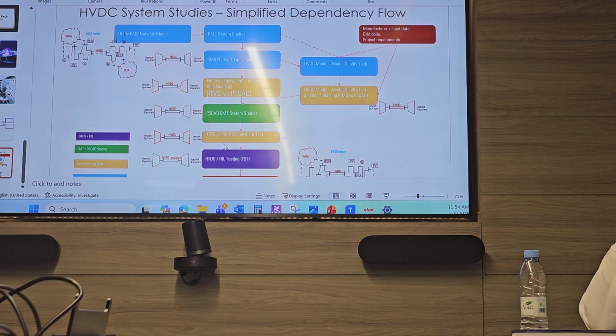So this is what I call factory acceptance test, and it is very important because there is a difference when you compare this testing with, for example, relay protection. Even if you test it on a factory relay, when you bring it to the site, you have digital numbers, you can tune it, check it, change it, you can play with it.